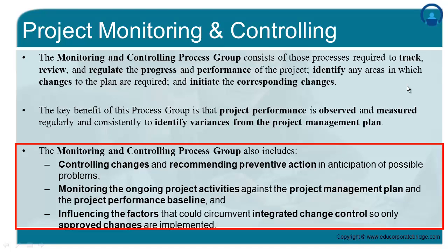We talk about both corrective actions and preventive actions. Corrective actions address situations where certain activities of the project are running behind schedule, so you take actions to cover up the lost time for those particular activities. At the same time, this also acts as a preventive action for the overall performance of the project, because small activities getting delayed would go ahead and delay the overall project completion date. So when you take corrective actions to fix the schedule for these activities, you are also taking preventive action to ensure the overall project completion is not delayed.